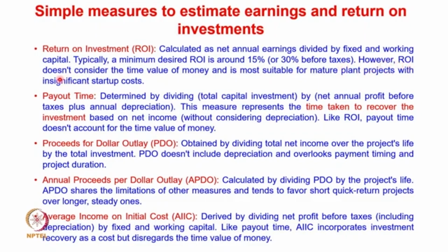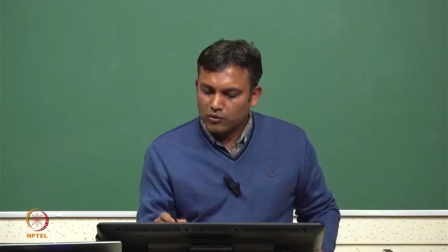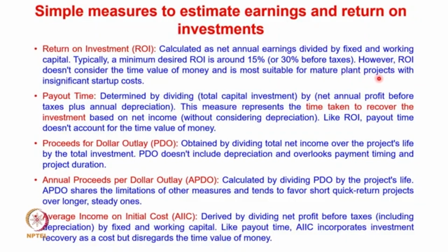Return on investment doesn't consider the time value of money. You can see that here we are not looking at how the value of the money is going to change over the project duration. It is most suitable for mature plant projects with insignificant startup costs. So whenever there are insignificant startup costs, you are not taking any loan from the bank and you don't have any financial commitments, and the plant is reasonably matured, only in that case does this return on investment make sense.